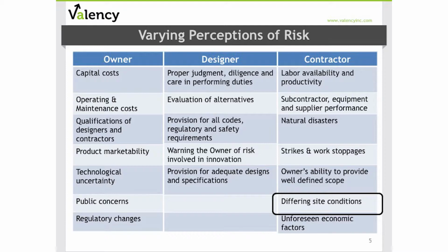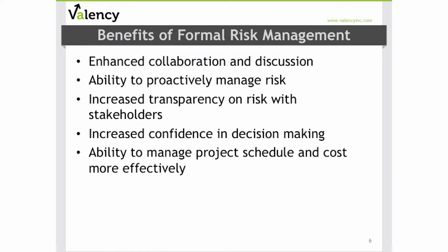And finally, if you're in the role of a contractor, you face a wide array of risk with every project you're engaged with, and your focus includes different risks like labor availability and their productivity. Do you have the proper qualifications for all of your subcontractors and suppliers? Are you at risk of any labor interruptions or strikes? And does the owner have the ability to provide a well-defined scope for you to start with? So in addition, depending on how contracts are written, the risks for differing site conditions, a really important one for us all, could be a contractor risk or they may be transferred from the contractor to the owner. So lots of varying perceptions of where risk comes from.